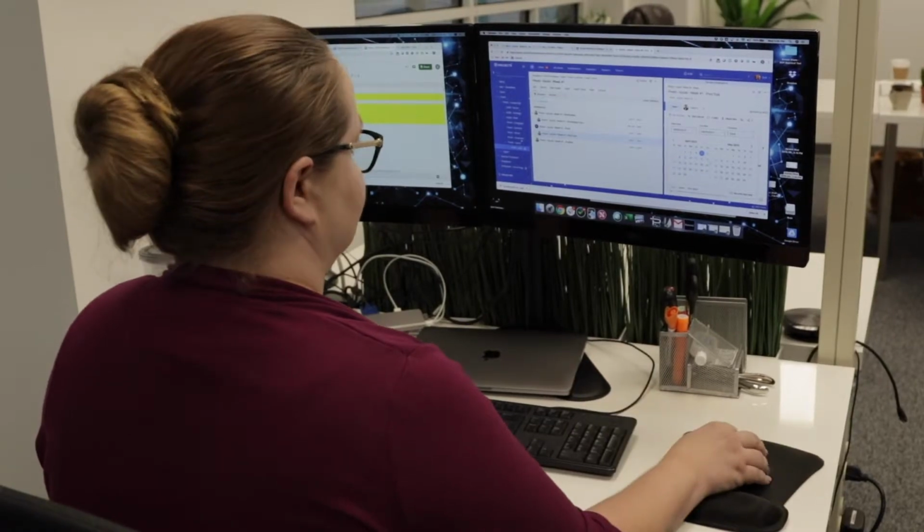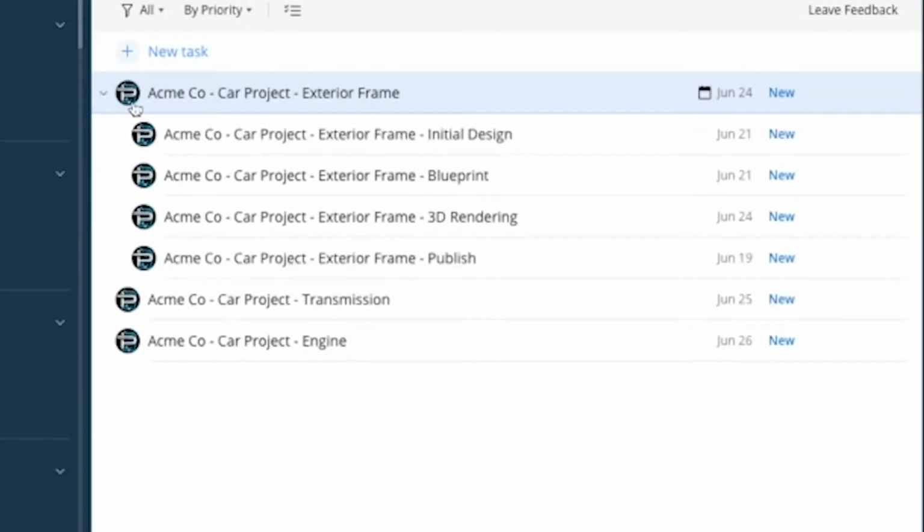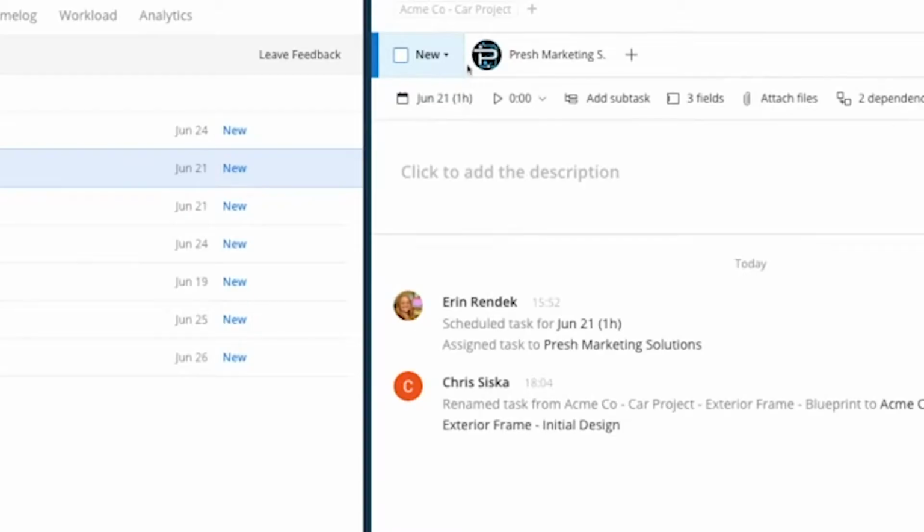Finally, we're going to break those deliverables into tasks. Initial design: create design and get design approved, create visual representation of the car to take to the stakeholders. Tasks are the steps taken to create the deliverables. They are smaller, more manageable pieces of the overall campaign. Each task must have an owner, or somebody that is responsible for seeing it to completion.